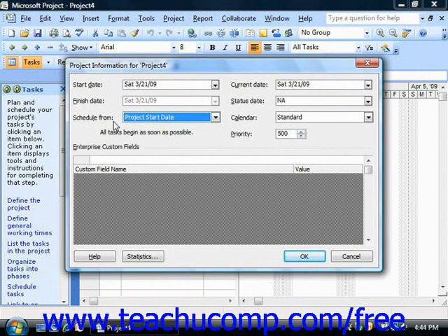This also typically is only useful when you have a standard project that contains standard, easily measured and controlled tasks that you know must end by a specified date, and you simply wish to know when the project should begin. Otherwise, you will probably want to pick the start date and calculate tasks from the start date to find the projected end date. Note that you only need to give Microsoft Project either the start date or the end date. It will calculate the other date based on the task workload that you then enter.